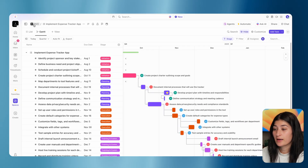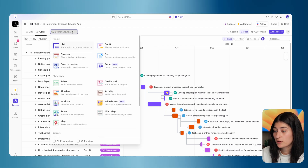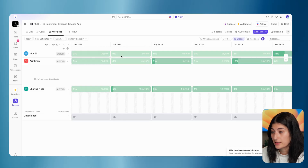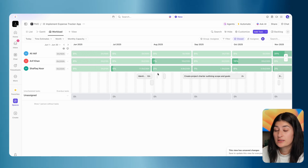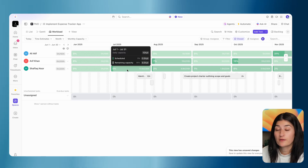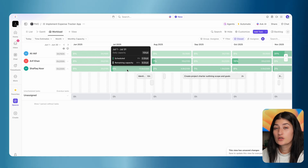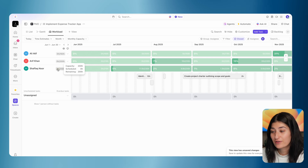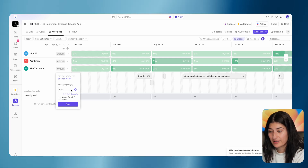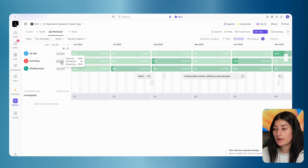We've officially built a project plan in ClickUp and we have our Gantt view to manage that project plan. If I want to see a workload view, I can always just continue to add some additional views. Let's add a workload view. Now I'm able to see my workload view — if I set this by month, it makes it a little bit easier for my project plan. I can see my team's capacity based off of the tasks I've assigned to them. I can see that for myself, I am 5% allocated in the month of July, so I have 95% availability and remaining capacity to work on other projects. I have 200 hours scheduled for a month — about 50 hours per week. If I am working less than that, I can set my daily capacity to eight hours or five hours. If you have different timings for different individuals, you can update that accordingly.